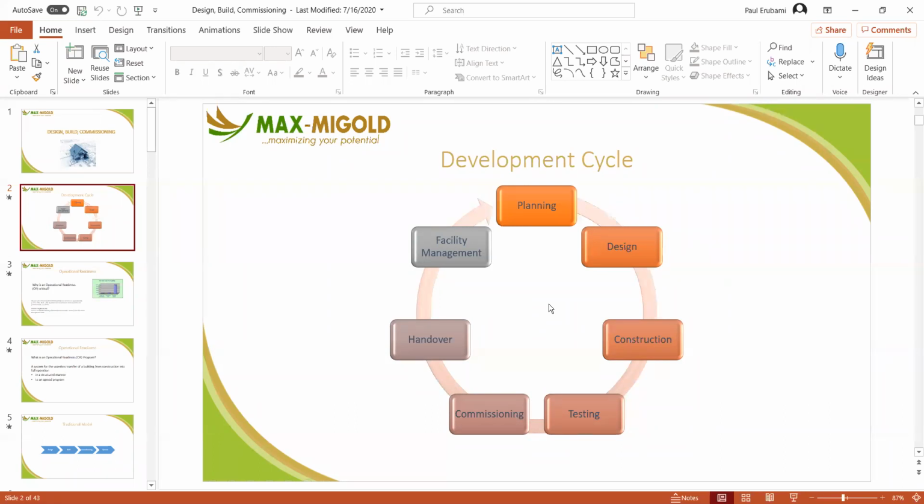You go, you do one set of work, you bring it back, the FM and the owner look at it and say, okay, this looks like the concept we are trying to look at. You go again, you come back again. Oh, the flow works well. We like this flow. Have you provided for all the spaces we require? Yes, you provided for. All right, go and put dimensions on them. You put dimensions and bring it again. Say, oh, no, this kitchen is too small. Oh, that laboratory is too big. Oh, this security guard's house is too small. How can we adjust? They go back, discuss and readjust, come back again. And so there's an iterative process for design.